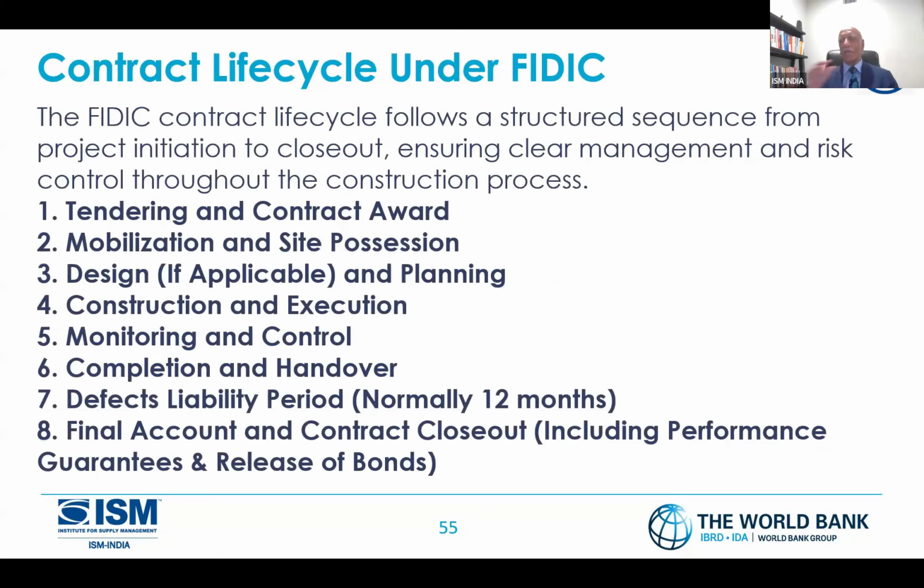So when it comes to the life cycle, let's talk about the life cycle. It covers the tendering stage, from the very beginning, the solicitation stage, award of the contracts, mobilization, site possession, design part, planning part, construction, monitoring and controls, completion and handover. And even after completion, it's still not over.